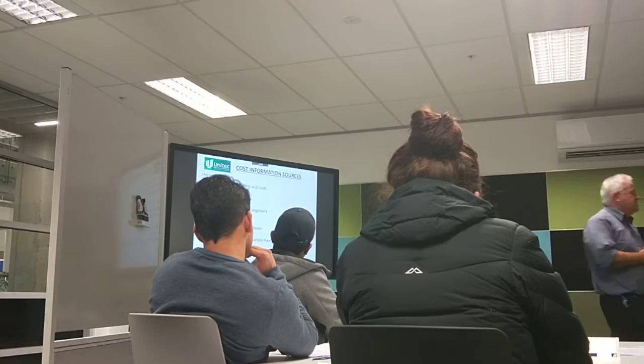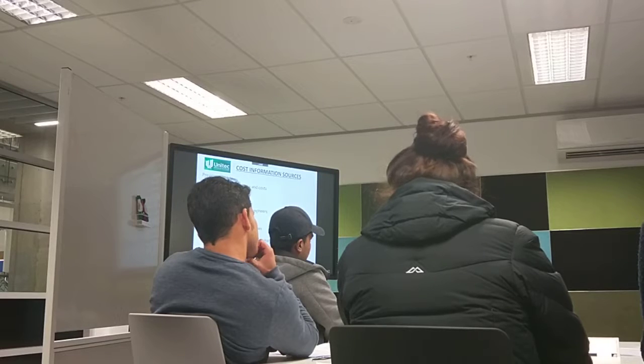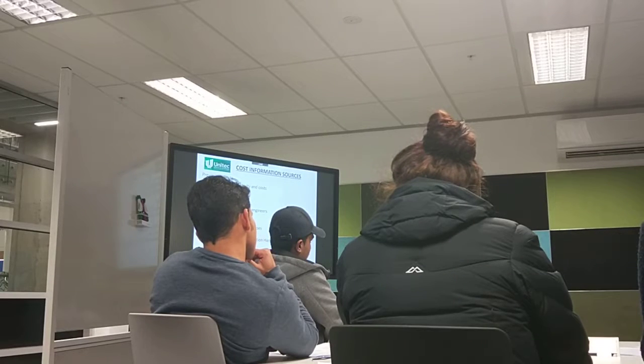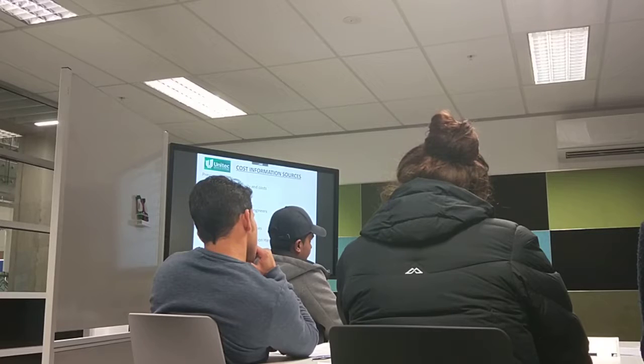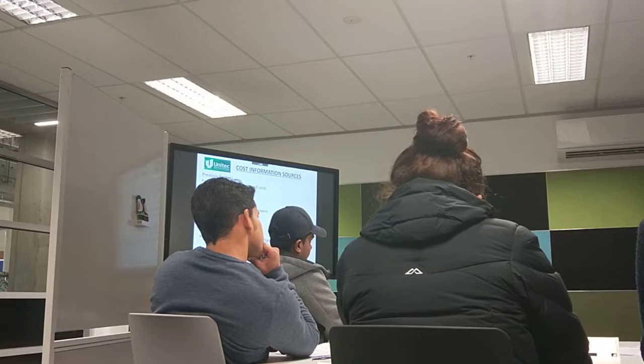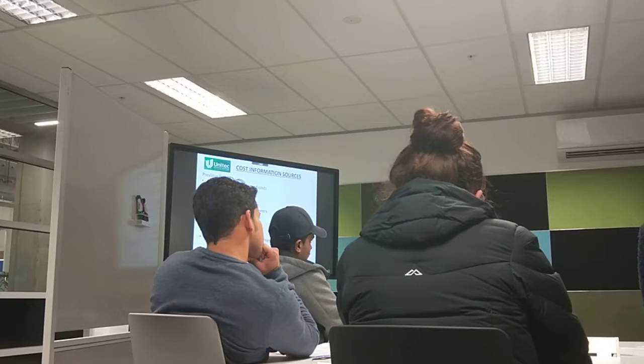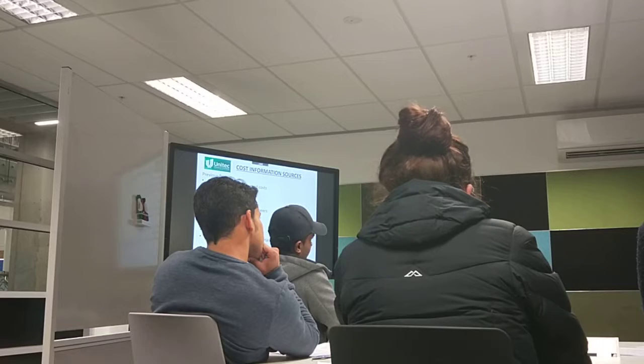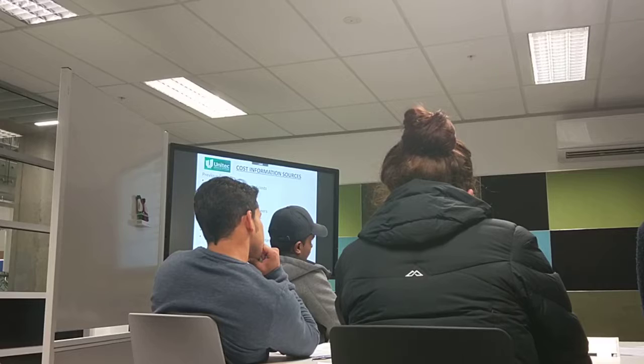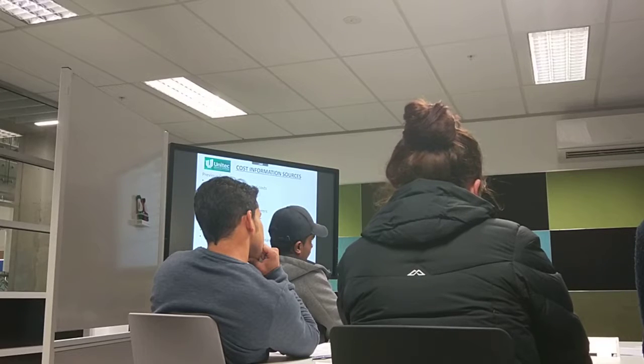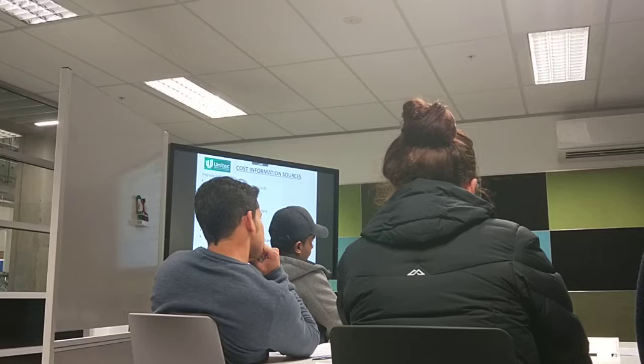Another way is experience. What I used to do, if we didn't have a price for it, and I used to work for a government department that never kept track of how much it cost us to do the works, so we had to work them all up from first principles. For a couple of years, when we were developing this new database, I'd go on site with a foreman and ask, what resources do you need? How long is it going to take? So you say, I need a truck, I need a couple of labourers, I need this many cubic metres of aggregate, and then I'd write it all down and go off and figure it out.